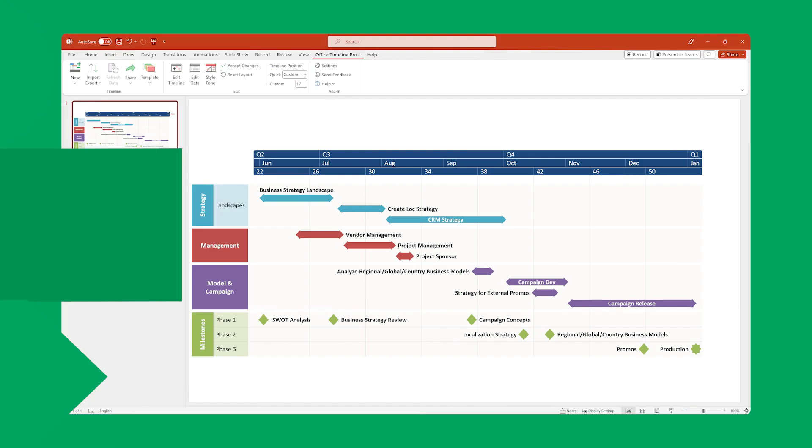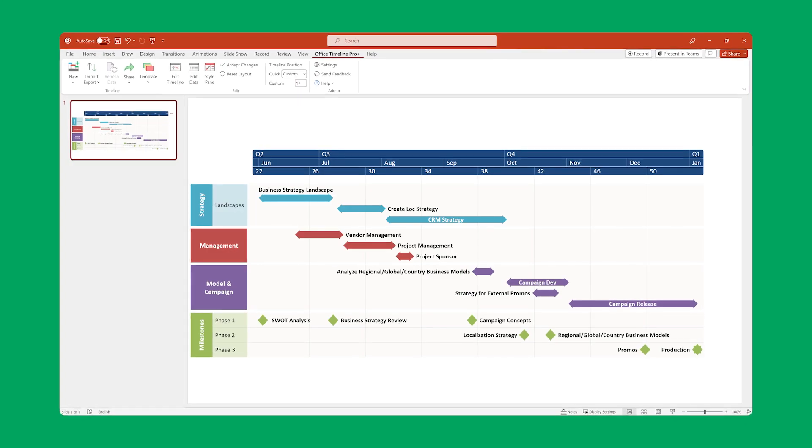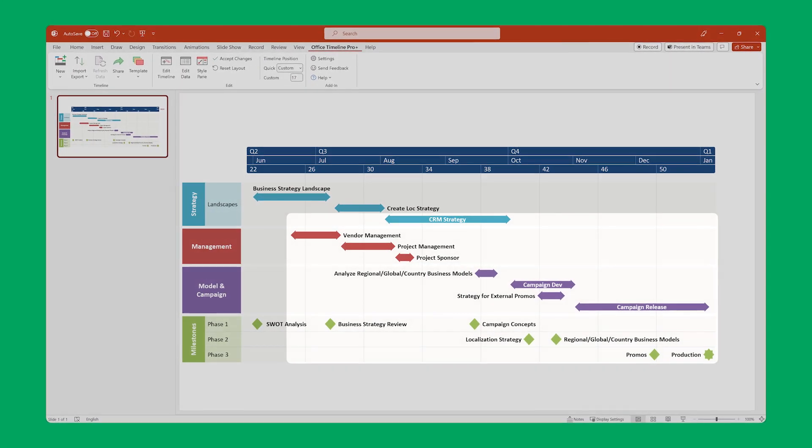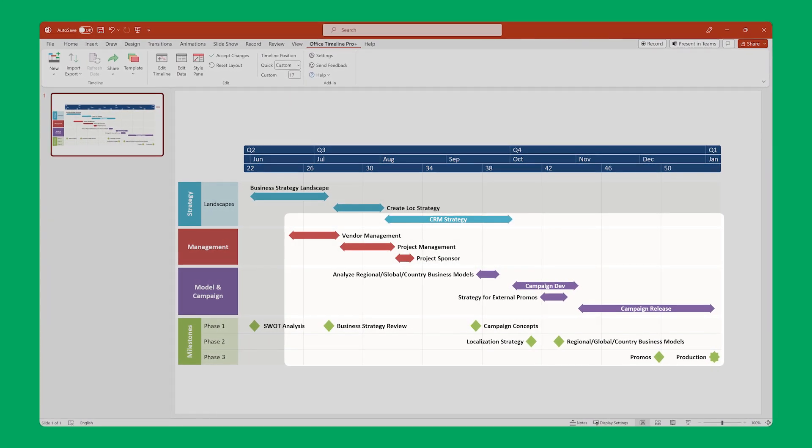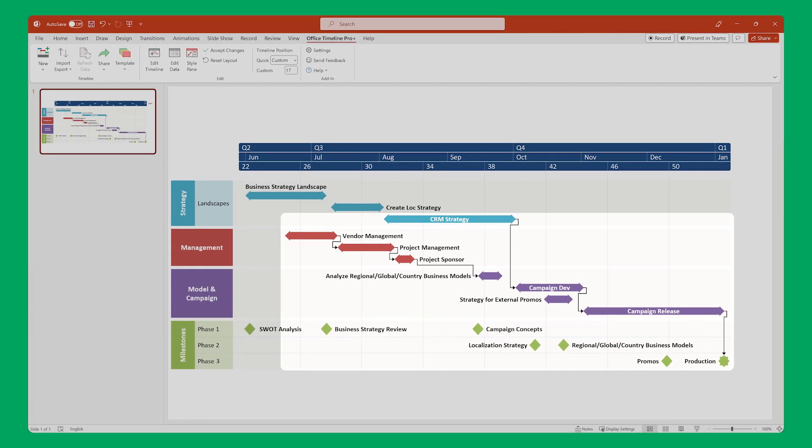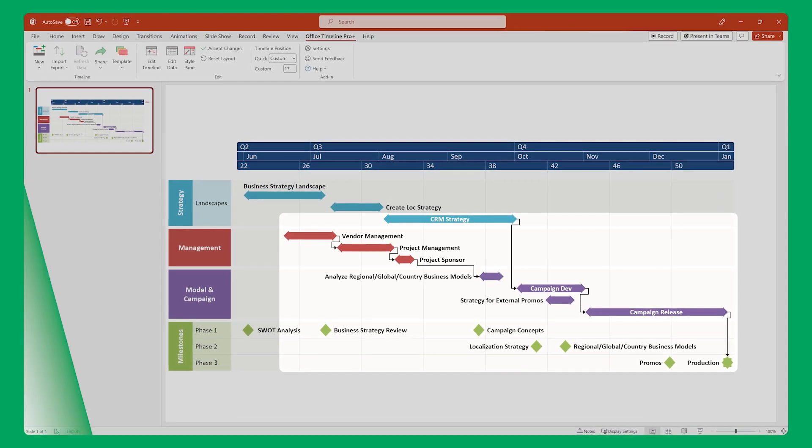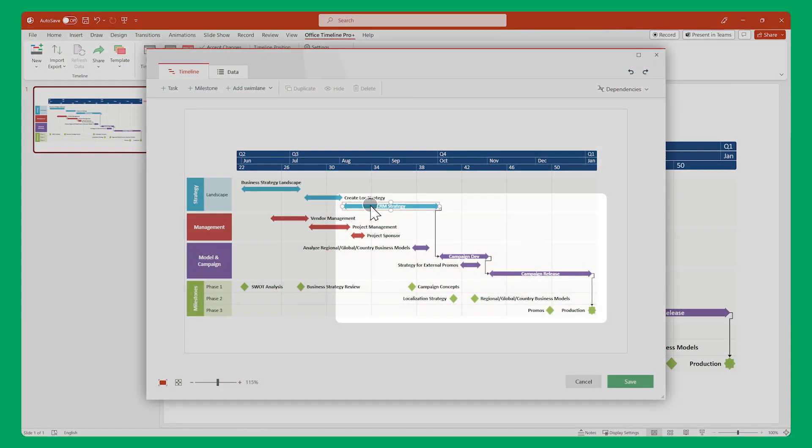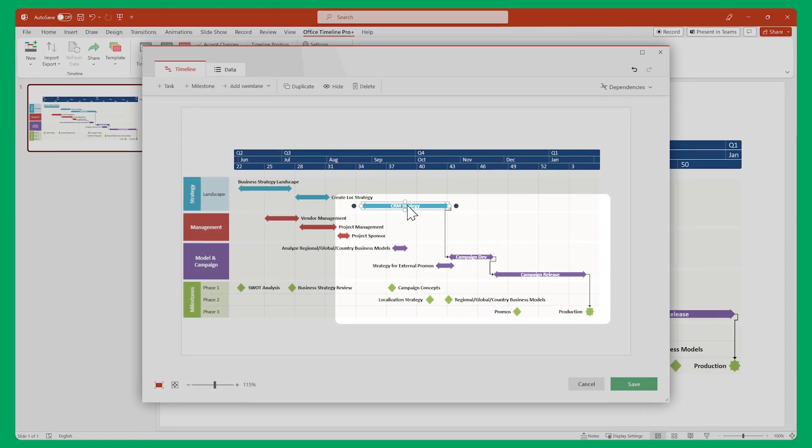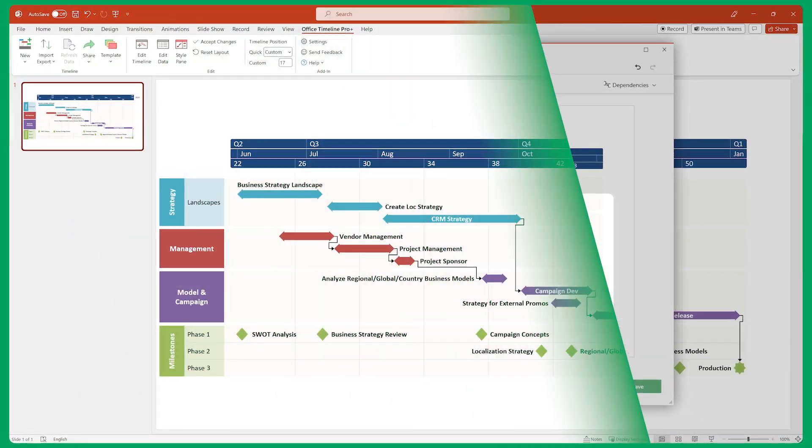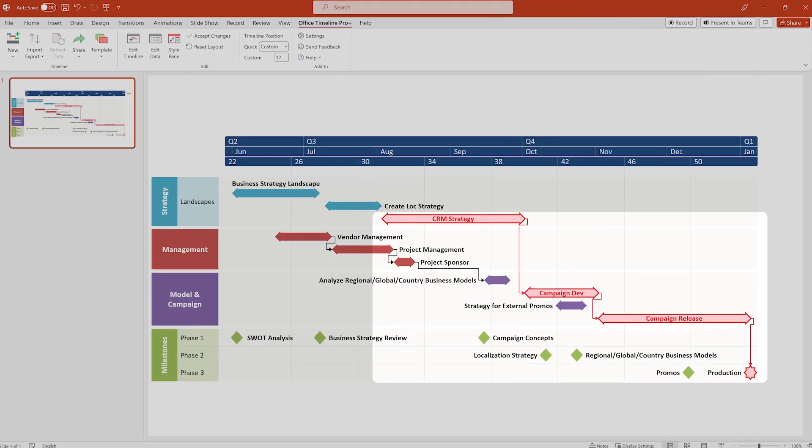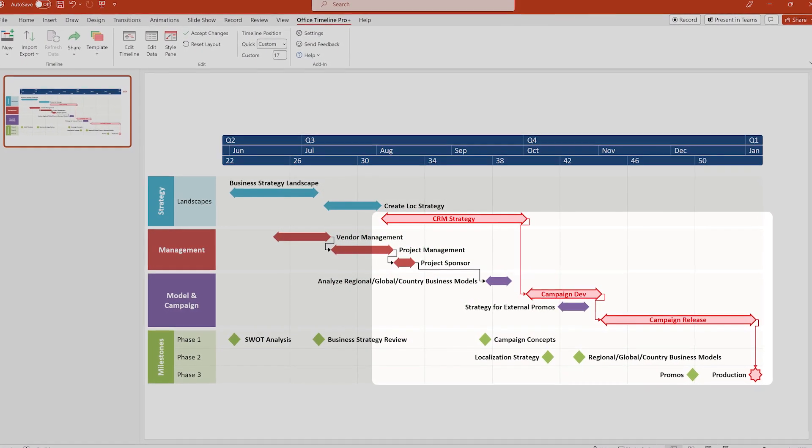Office Timeline allows you to add dependencies to your timeline to easily show how tasks and milestones are connected to each other, to shift dates quickly when plans change, and even to automatically calculate the critical tasks.